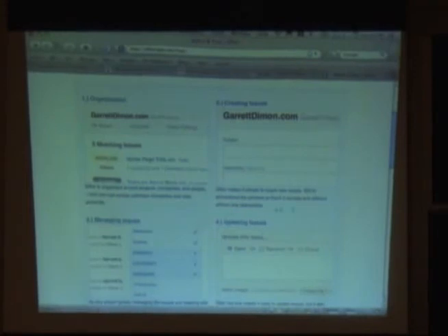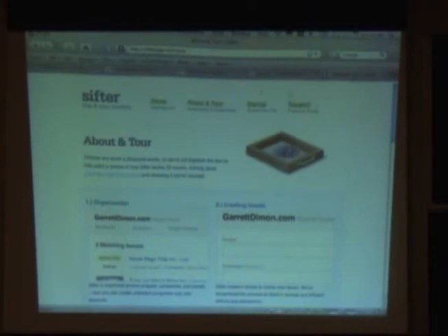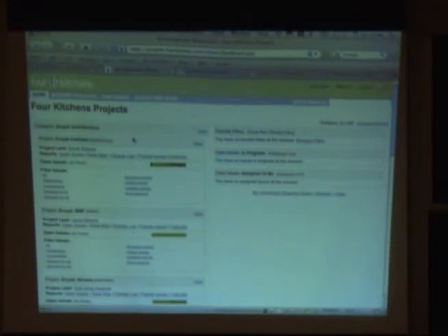So I can set an issue to resolved, but it's not actually closed and off the shelf until somebody checks it, until our QA department says it's closed. That's pretty typical. And then reopened issues are visually called out more than just open issues. So you know, oh, this keeps recurring, I should tackle that before I tackle this other bug that came in.